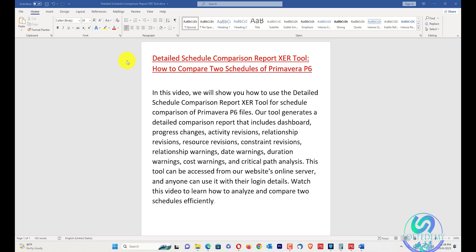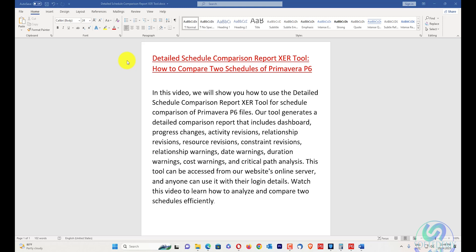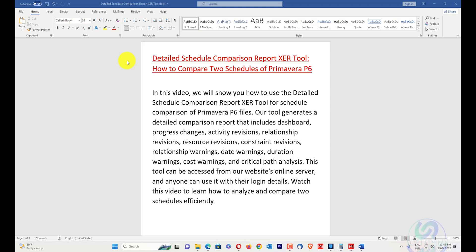Our tool generates a detailed comparison report that includes dashboards, progress changes, activity revisions, relationship revisions, resource revisions, constraint revisions, relationship warnings, date warnings, duration warnings, cost warnings, and critical path analysis.